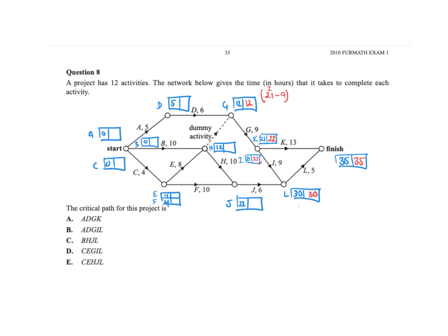Now if I go via the D, 12 minus 6 is 6 up that way. If we're sitting at H, wait a minute, if I'm going to go back to J down the bottom, 30 minus 6 would be 24. But because of this dummy here, H is also sitting at 12 because that's connected to that.